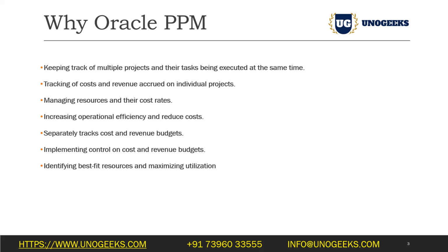So this kind of forecasting the system also does, and you can track this way how your project is performing, how the progress is being maintained. And let's say you have a requirement from the client that I will pay you based on the progress alone. It's not like you have completed 5% of the project and you are expecting some amount from the client. Let's say the client says, if 20% of the project is completed, then I will pay you 20% of our agreement cost. So 5% is only completed, 15% is still remaining for this particular task, so we will not be getting the billing.